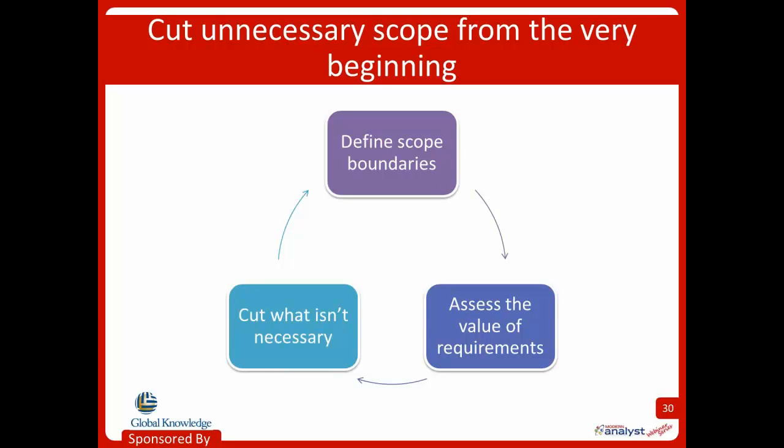So what I'm saying is we can actually look at, maybe a set of requirements like a feature, and I can decide, wow, does that thing, it only adds $10,000 of benefit, and I'm trying to get to a $1 million business objective. Wow, it hardly even helps. And oh, by the way, it cost me $8,000 to build the thing. I can use those kind of pieces of information to just start cutting scope. So the idea is if I can quantify that value, I can start to do this throughout the project duration.